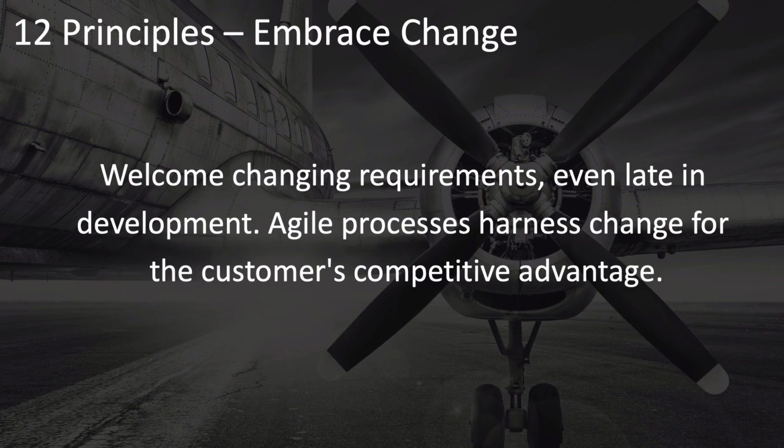This is often implemented by having a backlog, which is a prioritized, rank-ordered list of all of the things that the customer wants, and the priorities can be constantly changed and new items introduced and put into their proper order in the list of priorities.